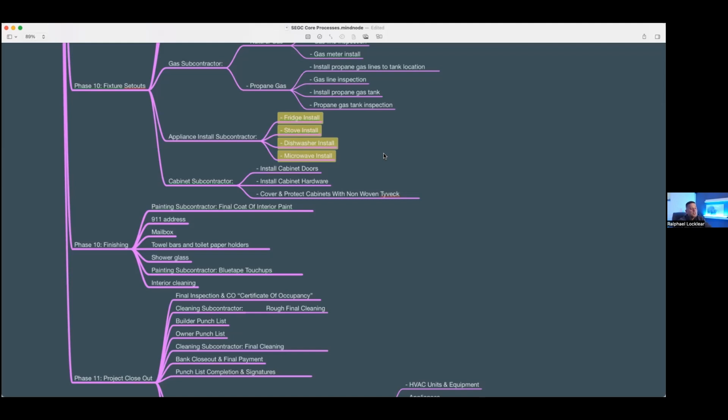And then once they watch the video, it's a project management tool now. Now you can turn to the Gutierrez job and you go watch that install where I'm telling you, here's what they typically fail at. Make sure the discussion plate's like this, right? Make sure the pressure test is like this. Make sure when they slide that dishwasher back in that they don't forget to screw in these 2 screws here, because if not, you're going to get a callback and the homeowner's going to complain that the dishwasher is not secure. You will look like an expert at every stage of the way.